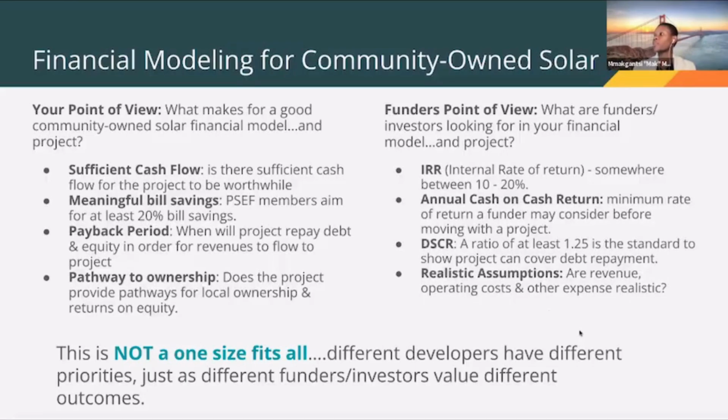Investors will look at the minimum rate of return, so your annual cash on cash return. We'll look at DSCR, which is the debt service coverage ratio, to ensure that you actually will have enough revenue to cover your debt and to service your debt, like loans, for example.